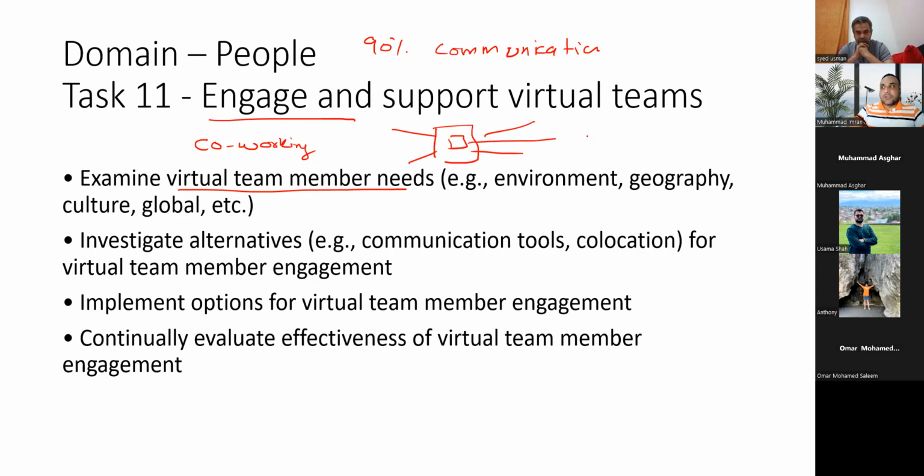When they are doing the work, it's part of the process, but on a lighter note, we have something called a configuration management system, which we discussed on the first day also, that all these shared portals should have the configuration management system enabled. So all the changes which are coming through, or all the work they are doing, can be recorded with the date and time stamp also. So everything is recorded, what it was, when it was updated, why it was updated. All the information can be tracked.